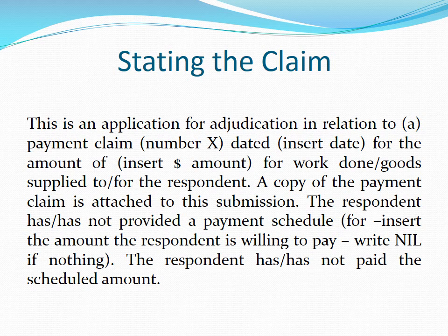As you can read, it identifies the payment claim being adjudicated and the amount of the claim. It also advises if a payment schedule has been served, and if so, what has been agreed to be paid, and if that amount has indeed been paid at the time of making the application. If you use Security of Payment Submission Writer, this section is dealt with for you automatically.